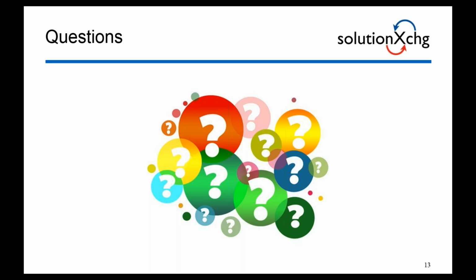And a question that very much fits with the second question we had: who needs to be involved in a data archiving project? Okay, excellent question. One of the most key resources would be a project liaison or project manager on the client side. This person should have the skills or the contacts necessary to bring in key business users, key stakeholders, et cetera, at the times they're needed within the project. So really coordinating with the business users, bringing them into the project at the key points, is one of the key members.